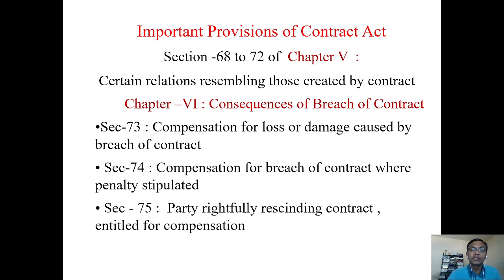Generally they claim overstay compensation or prolongation cost. Two years was the stipulated time, but we worked two more years at the site. So these expenses of overstay or prolonged stay, compensation by way of machinery, manpower cost, overheads, loss of profit, are claimed as per these provisions.